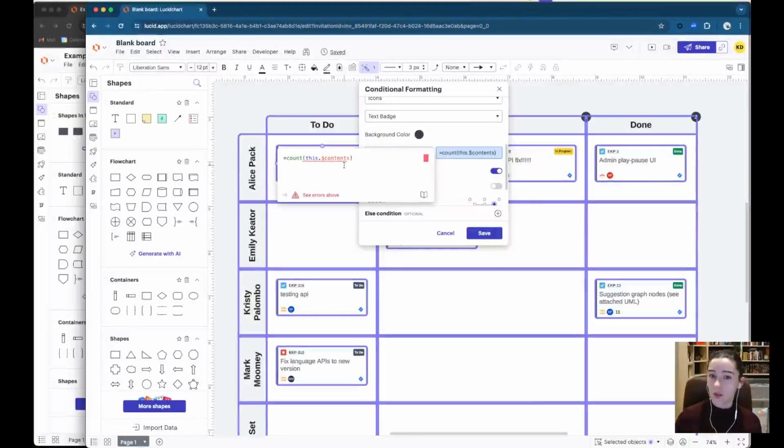We're actually doing something different now. We want to grab their story points. So what I can do is I happen to know there's a property on every Jira card called story point estimate. And what this .contents is doing is giving me a list of all those cards. So I can simply say, all right, from all those cards, I specifically want you to grab for me story point estimate. Now this will change as Lucid is looking for ways to map, depending on what the story points field is called, to map it to something really common. But what we've got here is this .story point estimate.